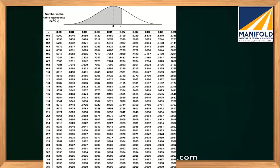This is the standard normal Z chart. The Z-score axis goes from 0 to about 3.6 or more. For the previous example, Z = 1.22 — you locate 1.2 on the row and 0.02 on the column to read the cumulative probability. There are also charts for negative Z values. From this chart you can calculate the required probability.